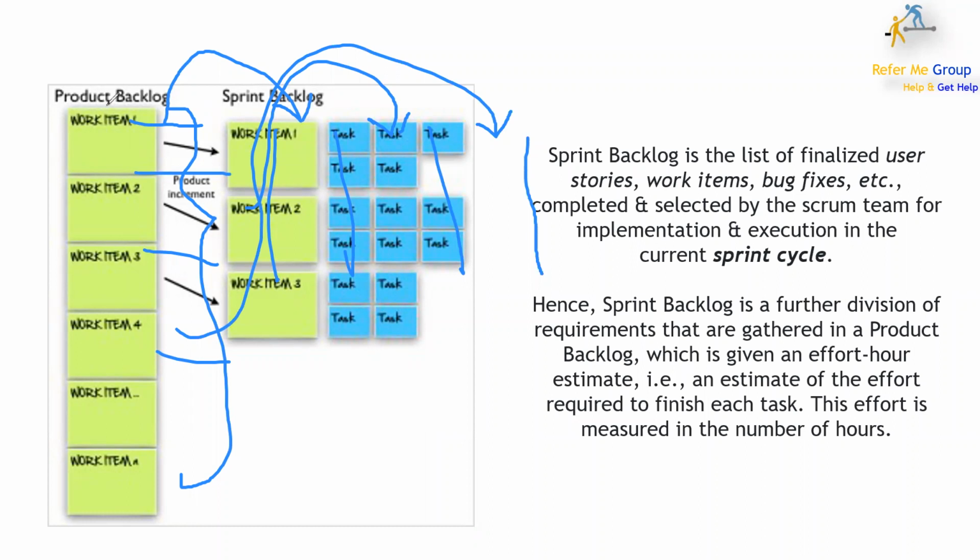Your product backlog is like a big book which consists of multiple items. They could be your features, your user stories, your defects, your technical debt, your spikes, right? Any item is kept, but in priority order. They could be refined, they could be unrefined, both, right? The product owner, who has ownership of maintaining the product backlog in priority order, knows in which order to deliver these items in which sprint. And your development team can come at any time and watch these product backlog items.